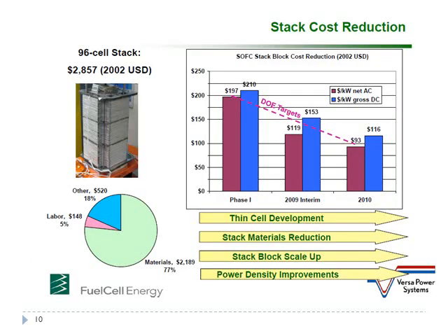So here's some cost estimating that's coming from FuelCell Energy. A couple of things I want to point out on this slide. One of which is down at the bottom. For their stack costs, what they're saying is that labor is only a very, very small amount of the cost that goes into these stacks. Materials are actually 77%, which means that these solid oxide fuel cells are highly dependent on the cost of materials.